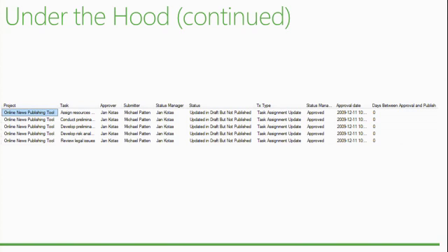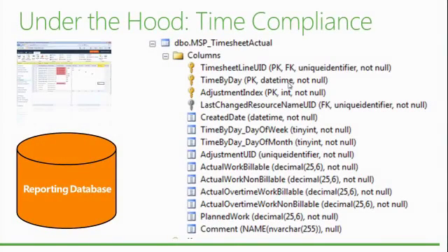No? Okay. All right, quickly. The next thing is under the hood, but this one is not really under the hood, but, well, time compliance. This one we are lucky because it's in a reporting database, actually. So all the information is stored in the MSP_TimesheetActual table, and you have a set of views also that are in the reporting database that you can use.